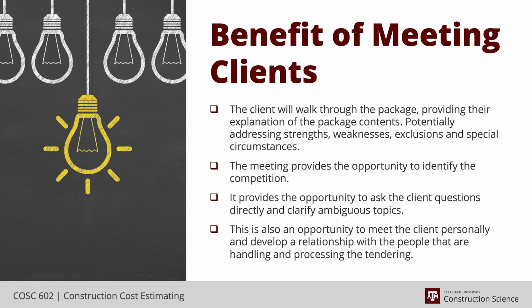It gives you an opportunity to ask questions of the client, and for the clients that issue that package early, which allows you time to go through it, normally we would arrive with a whole load of questions. We start asking those questions. But for the clients that give you the package at the meeting, you're pretty much just trying to absorb the package as you go, and asking questions that come to mind immediately. Then you have to go back, continue to study the package, and start sending in RFIs.